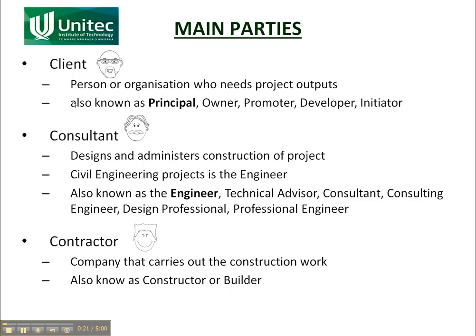We've got the client as the person or organisation who wants the project works — who wants the building, or wants the road, or whatever is being produced by the project — and they are the ones who pay for it. The next party is the consultant. They are the ones that have the skills to develop the design, to do the investigations, to figure out what's required, to document it as drawings and specifications, and then when it's being built, to make sure it's being built properly.